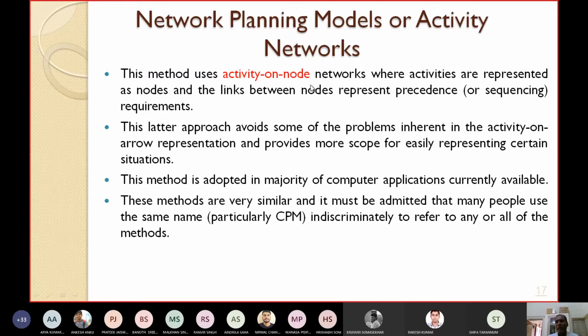So how to construct an activity network? It is better to first create the WBS structure. Then that WBS structure is refined into an activity network.